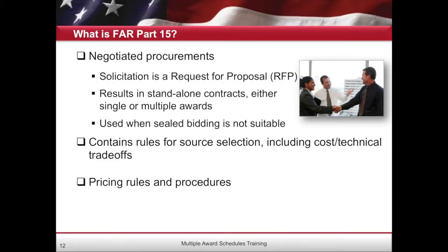So literally under FAR 15, we have the ability to negotiate, to discuss, to come to terms within the confines of what this requirement is. All right, but in government, it is not uncommon at all that we reserve the right under the rules of FAR 15, with a clause that says that we reserve the right to award without discussions. I have been in this situation myself a number of times, where I've awarded a contract under FAR 15 where we did not have any discussions with any contractors at all, because the offers were so clear and precise that they met our need that we were able to make a best value analysis and make the award.